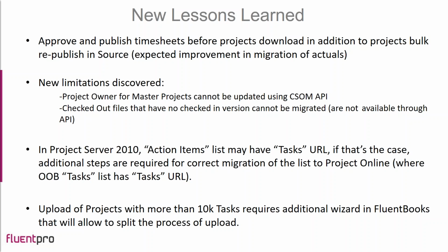Another lesson that we learned is when migrating really large projects, like projects that have 10,000 tasks and more, it can be a pretty tricky process because first of all, it takes a long time and upload of this project can fail. So we were experimenting with how to handle this situation, and migrating projects of this size would require an additional wizard in FluentBooks that would allow to split the process of the upload.